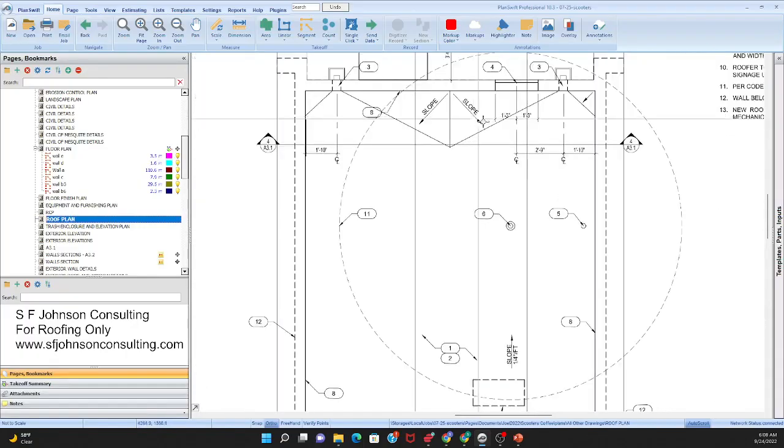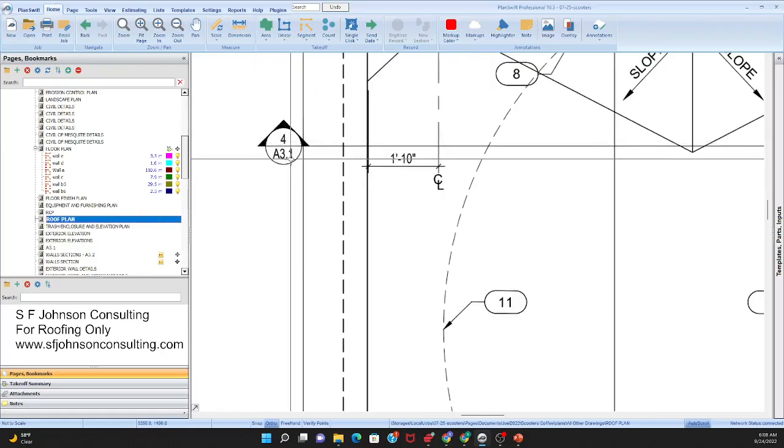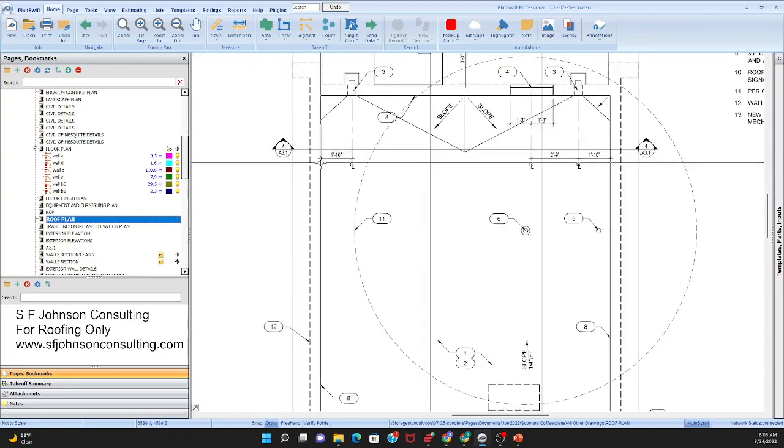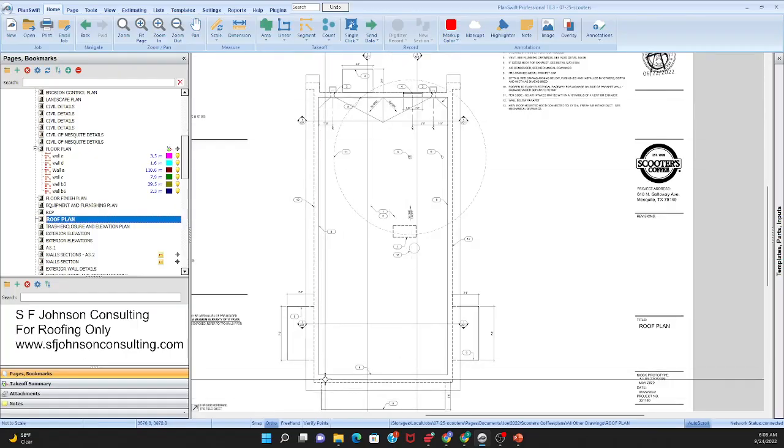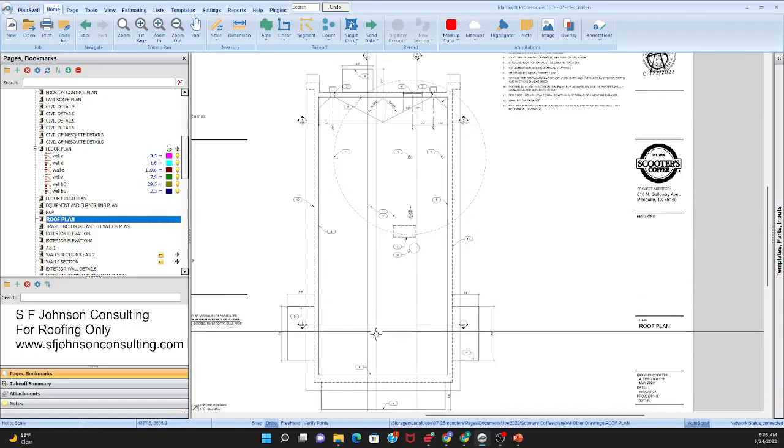Now, once we get here, it's going to change. We're going to look at 4 over 3.1. So if that parapet wall happens to be a different height, it's going to be at this point forward. We're going to calculate the different height. But for this whole section, till we get here, it's going to be whatever height is shown.